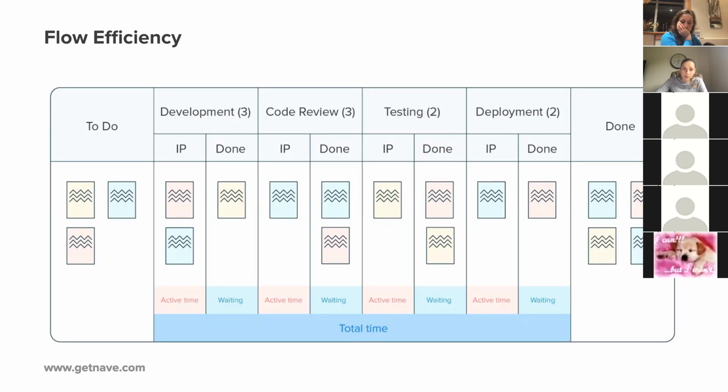This, however, is a misconception, as more work in progress means more multitasking and queuing. Along with an imbalance between demand and throughput, this is in fact one of the most common causes behind long delivery times. Any reduction of inactive time will improve your overall cycle time. Looking at wait time is usually the easiest and cheapest area to investigate first when it comes to process improvement. Improving flow efficiency starts with visualizing your wait.